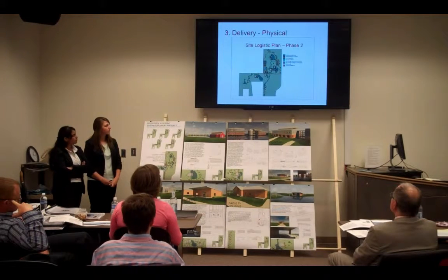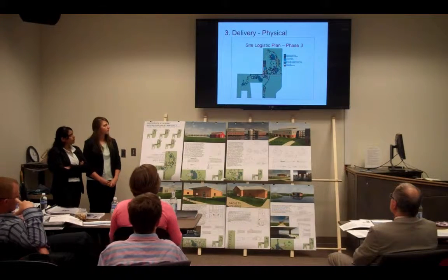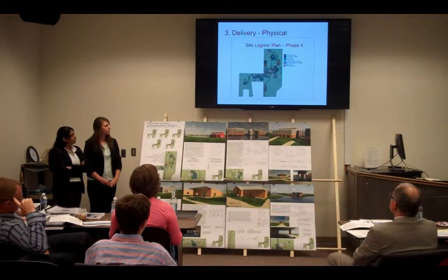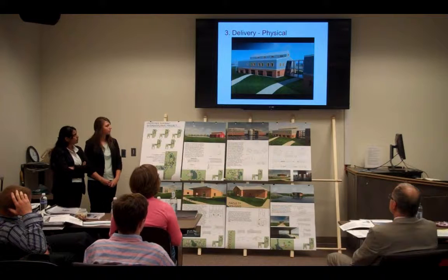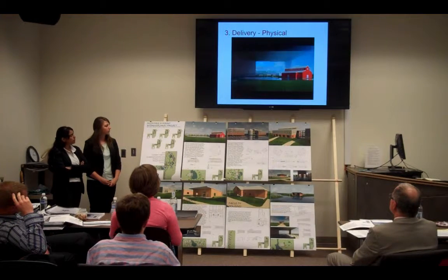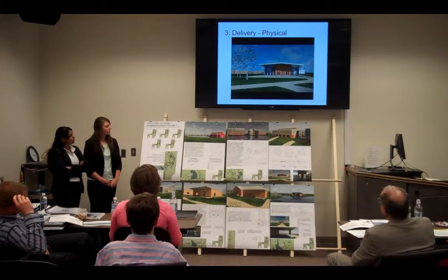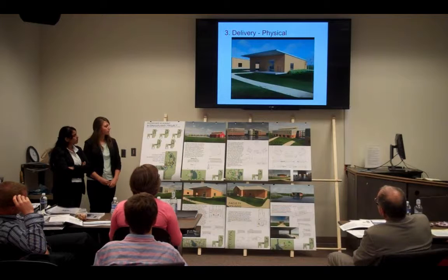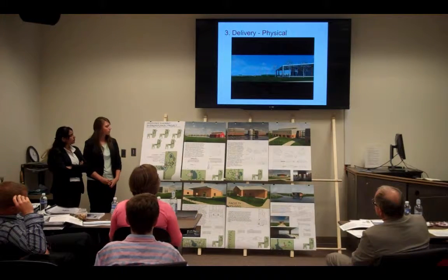Concerning safety of students, separate access roads for material logistics have been provided to avoid future traffic of students with construction workers. Barricades around the construction will be provided to mitigate the risks. The majority of the construction material is wood and the structural insulated panels erected in place. Windmills are provided near the barn, which is a symbolic structure in the project. Construction of staff housing and student housing is a combination of wood and glazed panels. Thus, the phasing has been done in order to optimize the inventory.